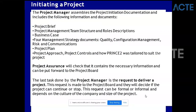The last task done by the project manager is to request to deliver the project - the request is made to the project board, who will decide if the project can continue or stop. The request can be formal or informal. At this point the project board has already approved, so in 99% of cases they will approve. Only if they had given a conditional go during the SU stage - sometimes you get a conditional approval where they say they're okay but they don't have enough information - they will further review in the initiation before approving for the next stage. These are called conditional approvals.